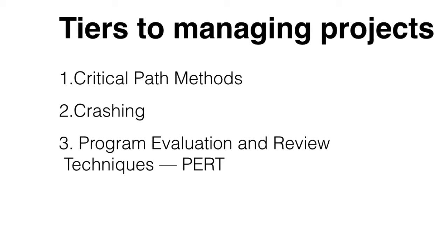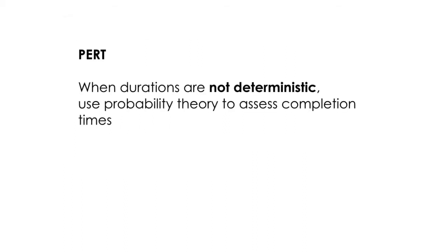This technique allows us to input a probability distribution on each activity duration and utilize that distribution in determining how long the project will actually take to be completed.